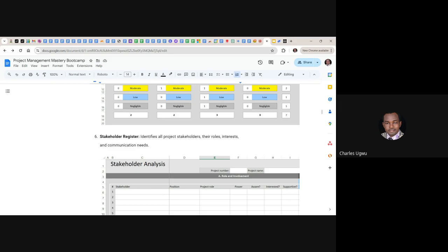Most of them are law agencies. They are like council officials. So you need to understand the kind of law or regulation and make sure that everything is in order so that they cannot come and seal your site and put your project in bad shape. And once things like this happen, the project sponsors or the stakeholders are not going to be happy with you, because they feel you are the project manager and you should know what to do to avoid such problems.